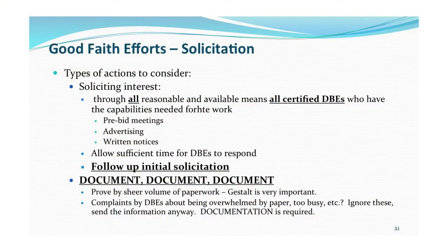Now, I've got many clients who have lost projects because they couldn't demonstrate good faith efforts. And the reason they couldn't demonstrate good faith efforts is they simply didn't keep track of the documents and the efforts that they did and put it in writing so that they had something to deliver to MnDOT or any federal or state agency to prove what they did. So let's take a look at what you need to do.